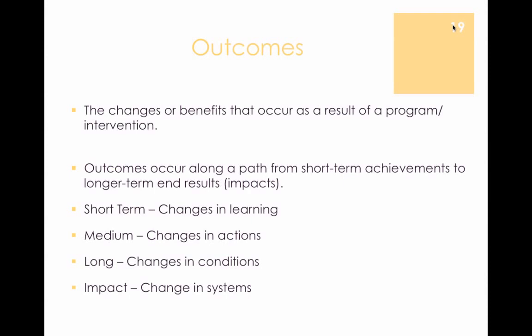And again, it goes back to those process measures we were talking about before. These outputs are also known as deliverables or milestones in a work plan or a timeline. And with that, it may be an activity, maybe the delivery of services or the output. For example, if an activity is, we're going to deliver tutoring sessions, well, the output would be we will have conducted 50 tutoring sessions by June 2003. So again, the activity says what you're going to do. The output describes to what extent.